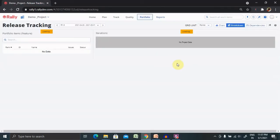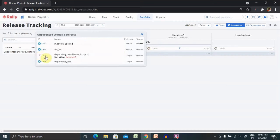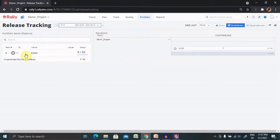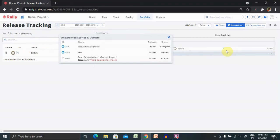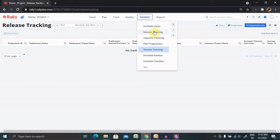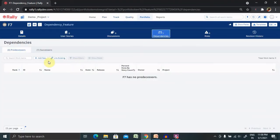Once I jump back I'll find both successor and predecessor are available. If I want to view the dependency report, I go to Release Tracking where I can find my dependencies available inside the breakdown structure. When I select this user story, I can find it is dependent. I need to select the filter and tag to a feature. You can see this icon shows that this user story has dependencies. I need to select the iteration for the feature level dependencies.